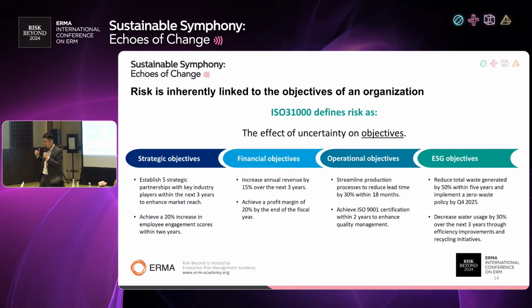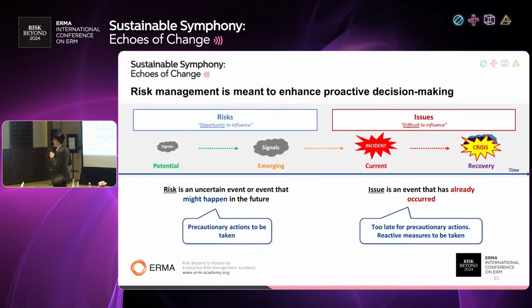So it's important because we have seen organizations where every quarter they update the risk register, done. That's it. But the missing step here is to re-look at it and re-link it back to what our objectives and KPIs actually are. That is critical in today's day and age, and this is something that we emphasize a lot to the projects that we are on these days. And what's more important is that risk management should always be seen as a proactive initiative and not a reactive initiative.